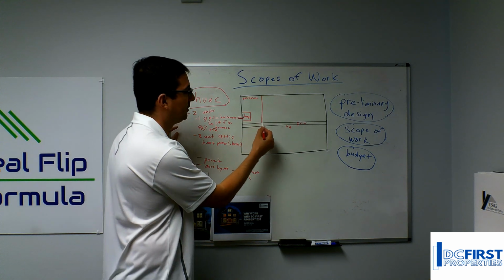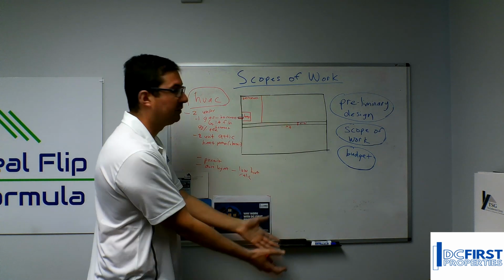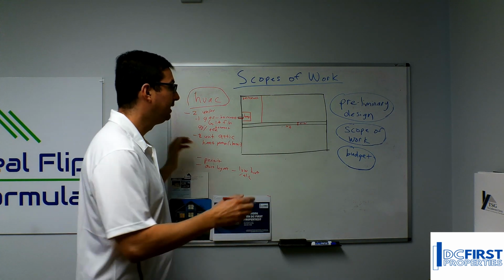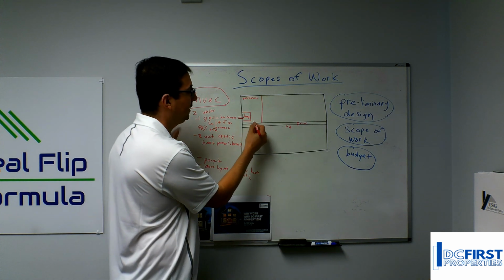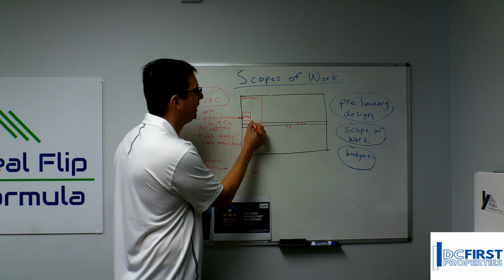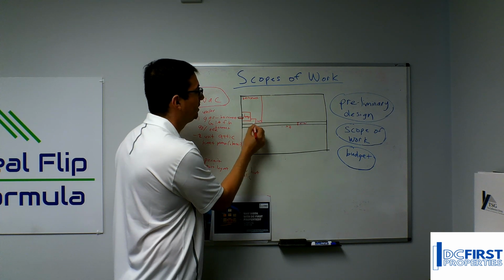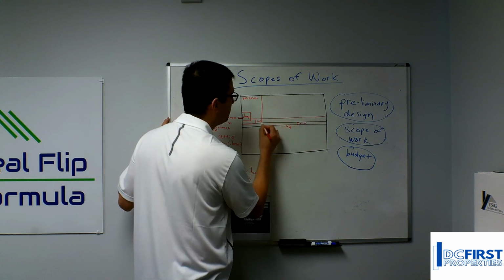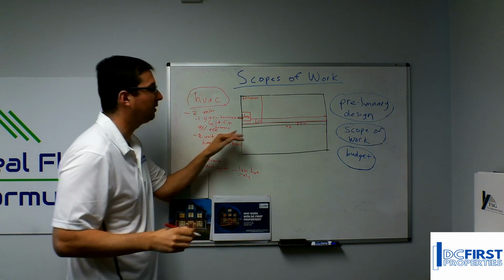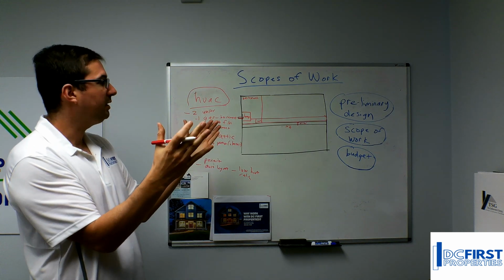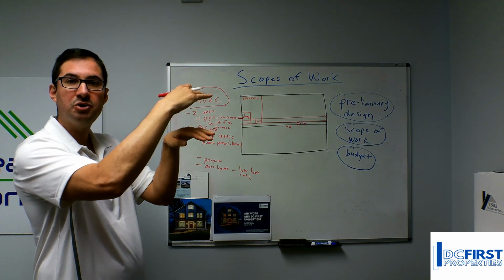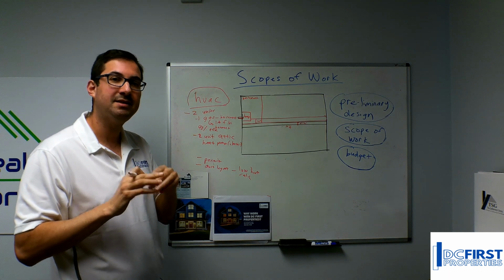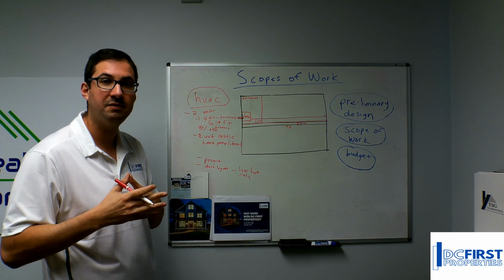You don't want to have, for example, ductwork that's going to hang below this middle steel beam in that basement because someone's going to hit their head on it. They're not going to like that. So part of the scope of work is requiring the contractor to put, in this case, probably a 14-inch supply trunk, which is 6 inches tall, down the center of this basement, right? We're going to require in our scope of work that the contractor has a really wide and short trunk that fits under that beam right down the center. Why down the center? Because the center of the house is where you get the best efficiency for HVAC work.